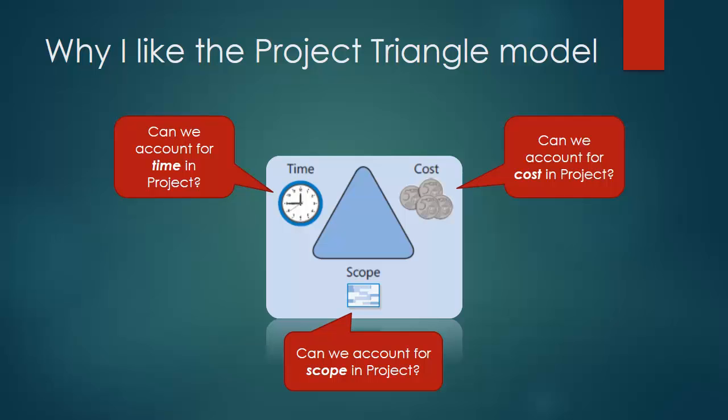Okay, when we're talking about Microsoft Project, the things that we model there may have costs associated with them, and most of those costs are derived from assigning work resources to tasks to generate work in Project. And then Project does the math to calculate associated costs based on resource pay rates, the durations of those assignments, and other factors. What are the things would you say might be missing from this model?